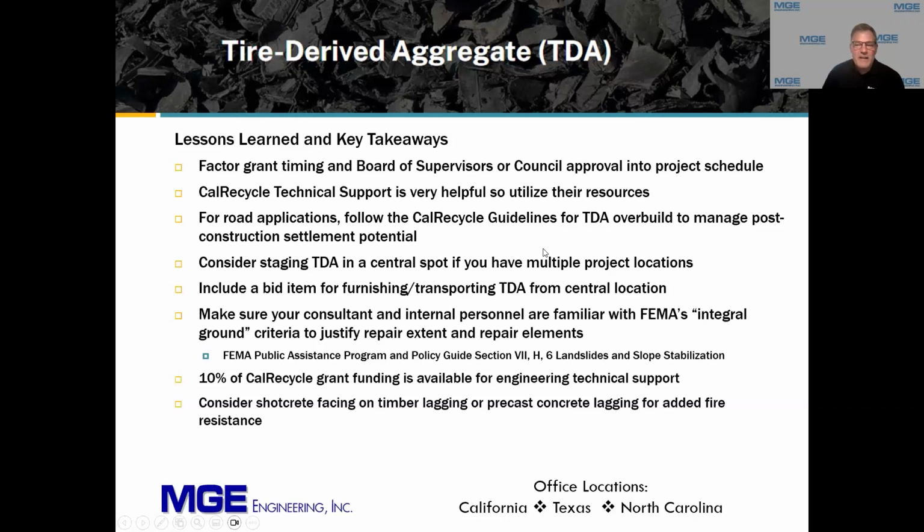Followed CalRecycle TDA guidelines for overbuild and to manage post-construction settlement potential. Stage, like, and if you have a situation like ours, we have multiple projects, locations, the grant will only pay to deliver it to the site once. So we selected a TDA fairly central location for each of our east and west construction contracts.